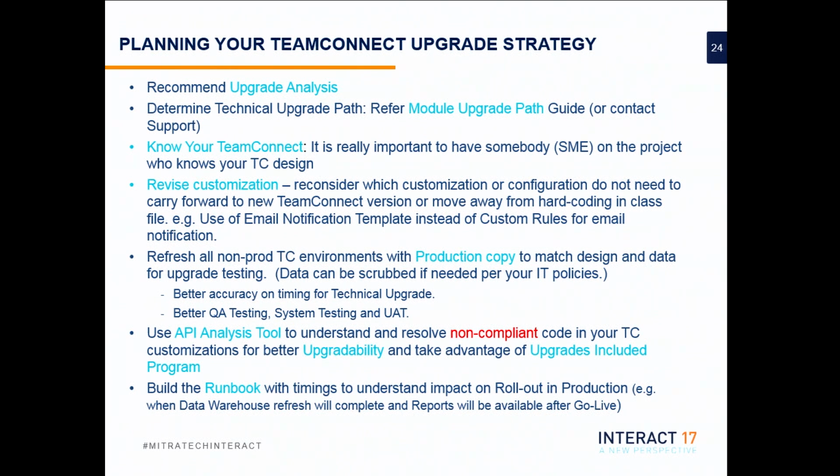And then talk about the run book. So when you go to the mock upgrade, make sure you document all the steps you took. What are the lessons learned? If there was any data you had to correct, or if you made specific configuration changes, make sure you document it so that when you do the rollout in production, you know how long it's going to take, and how long your TeamConnect production is going to be not available for your end users. Example, data warehouse refresh.